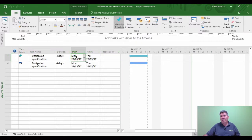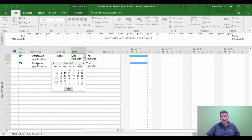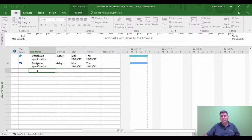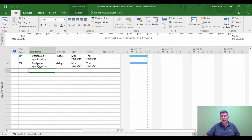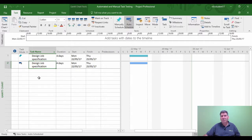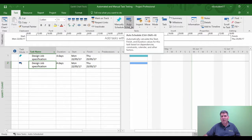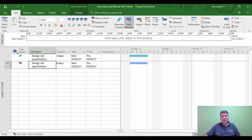How was the start date for the manual schedule task set? In this example, it was set by actually using a little drop-down arrow next to the start date and choosing the 22nd. To prove the point that auto features will only control auto-scheduled tasks, I'm now going to change the project start date — only task 2 will be affected. I'm not going to click on any particular task; I'll click below the tasks.